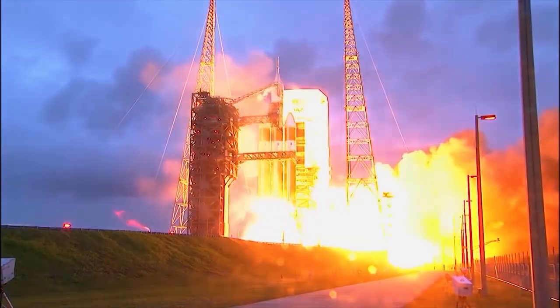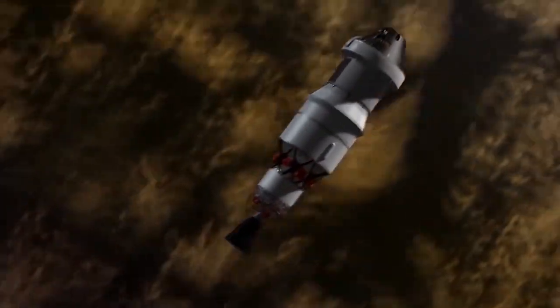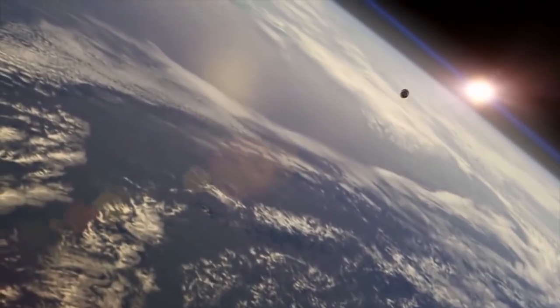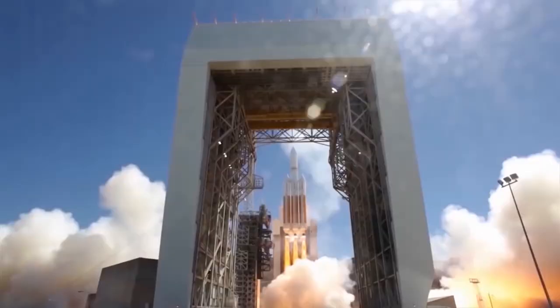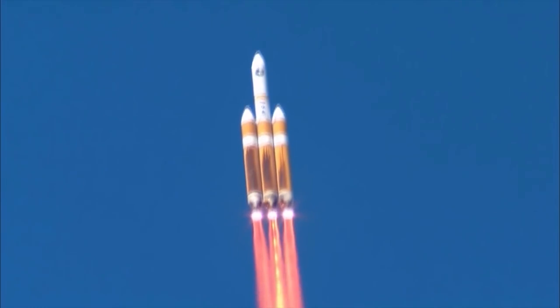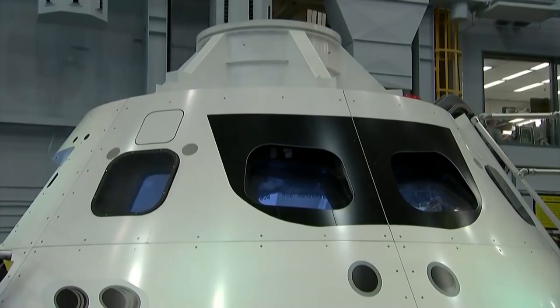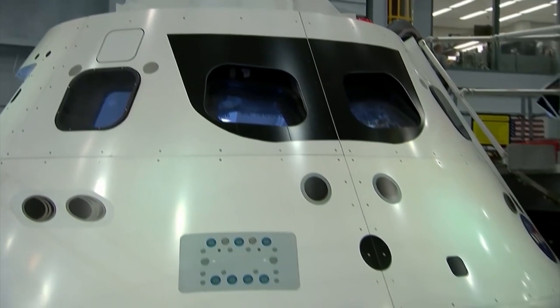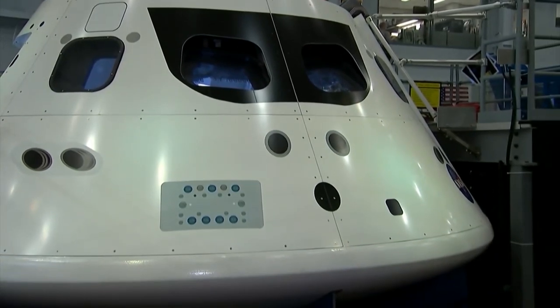The team will have a wet-dress rehearsal that duplicates the mission short of its liftoff, including the countdown procedures, propellant load, and draining tanks. The test will help NASA set a target launch date for Artemis 1.